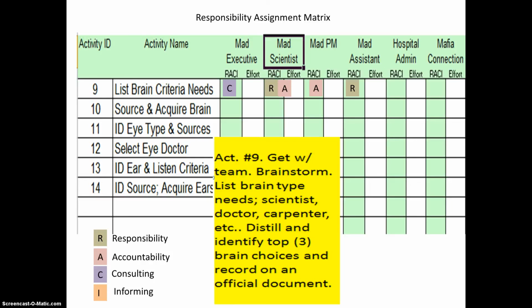But this is not a good scenario, because with 2 people being held accountable, there is potentially some disagreement and some resistance on ultimately what should be the final work package, and it is best to keep one sole person singly accountable rather than a number of people accountable, because then that can lead to some less than clear expectations among those who are accountable, and that is a difficult aspect of project management, to be able to have more than one person be accountable for a situation.